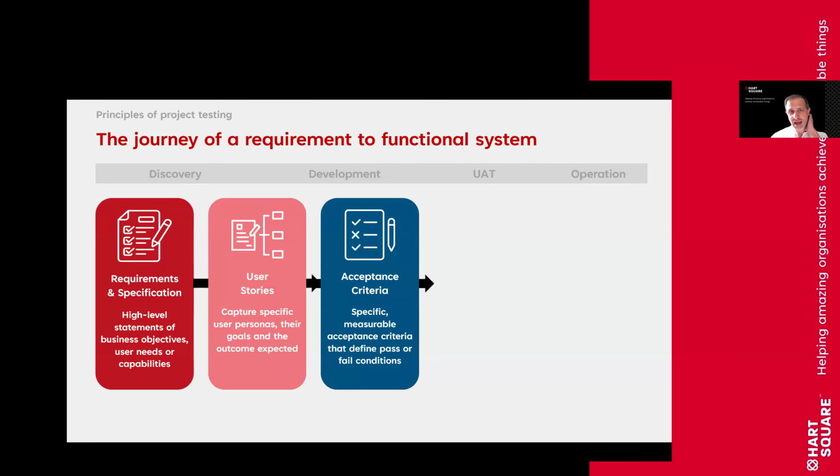Now, this is really the next stage where we start writing acceptance criteria. Typically acceptance criteria should initially be drawn up by your technology partner or your consultancy, and helping you define those acceptance criteria is really the important part here. And actually, if I'm honest, I think this is an area where I've seen a number of projects not necessarily get delivered properly because the importance of acceptance criteria hasn't really been understood. So it's really important to take on board that acceptance criteria need to be specific, so very specific.